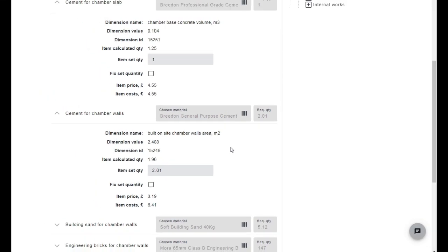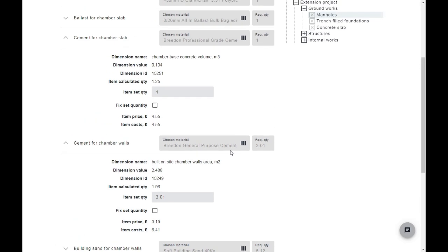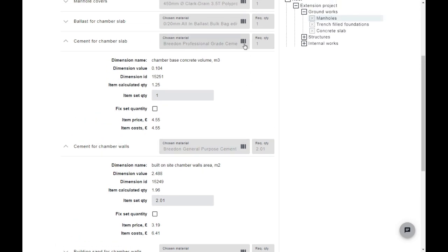It is crucial to pay attention to the number of units of a materials item that are sold for the listed price. For instance, if you choose a materials item that is sold by the supplier in bulk, for example, 20 units, but the actual quantity required for the project is only 2 units, then the quantity set will be rounded up to 1 from 0.1, resulting in the purchase of 20 units. In such a scenario, it is advisable to return to the Build Specifics page and choose a materials item that is sold in single units.